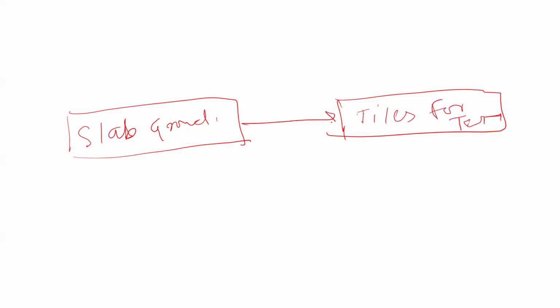And this is linked like this. Are you getting this link? Is it a compulsory link? Yes. What does it mean? It is a compulsory link. First we have to cast the slab, and only after that the tile flooring will be done. You cannot start putting the tiles and then say that I will do it when the slab sets. Correct, Rahul? You can't do that. I mean, it's foolish. You won't put tiles in the air. That's what this is called: mandatory dependency.